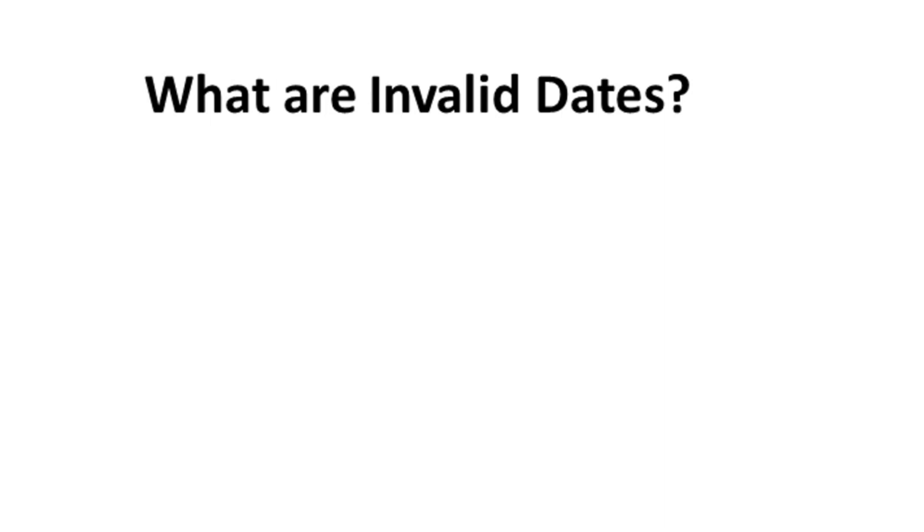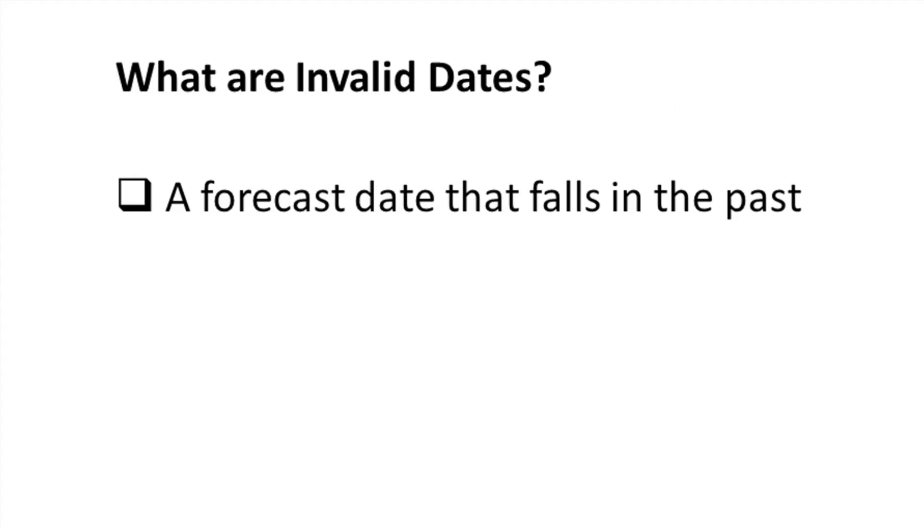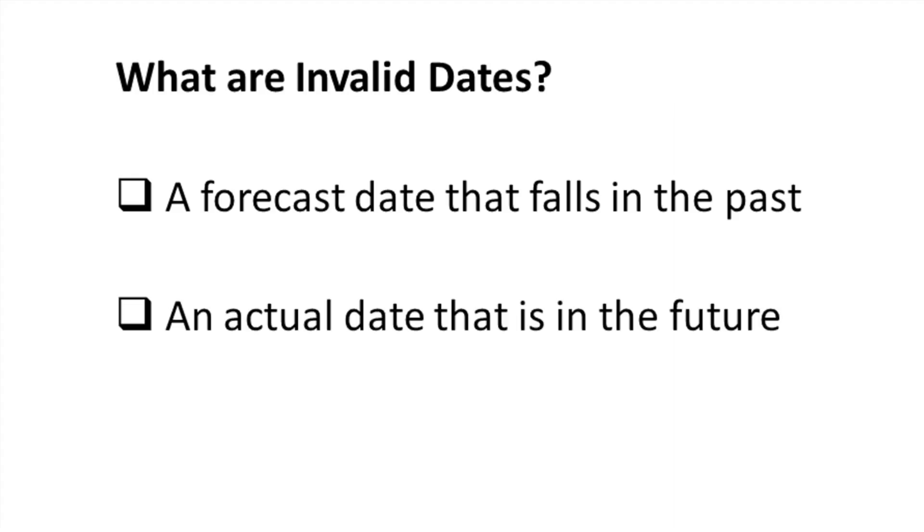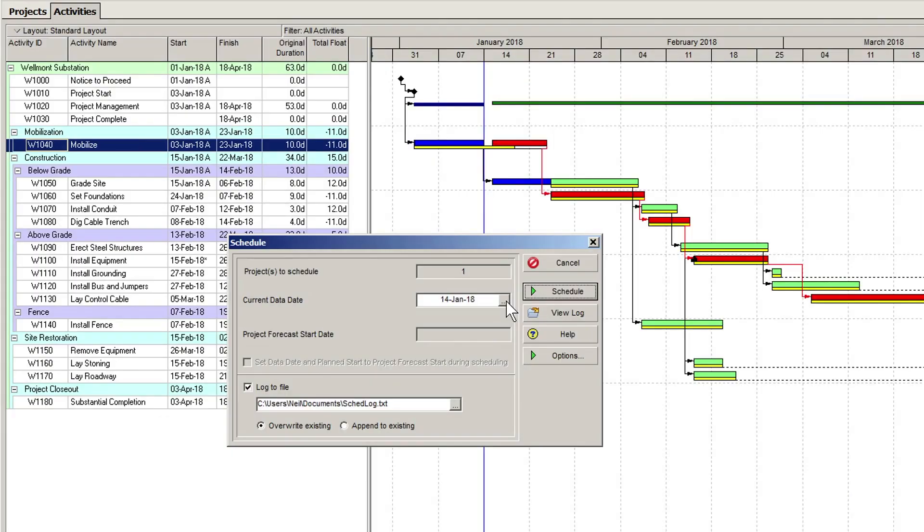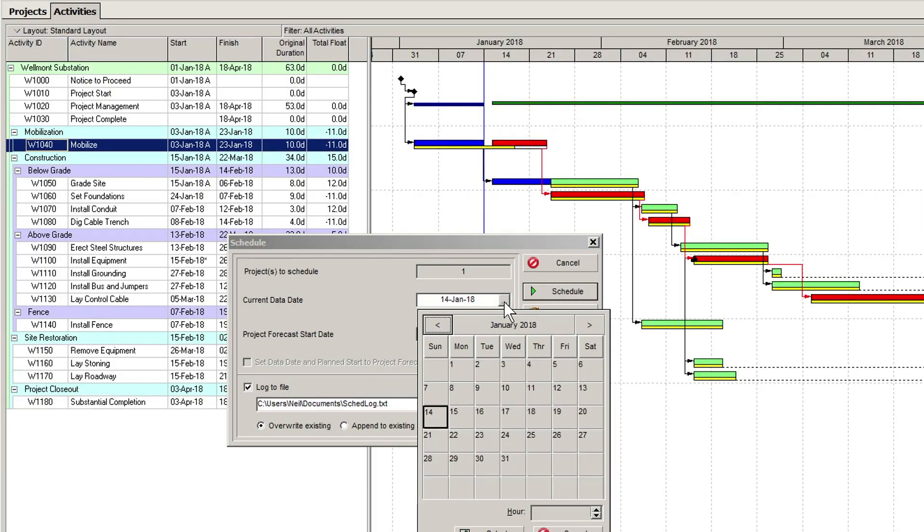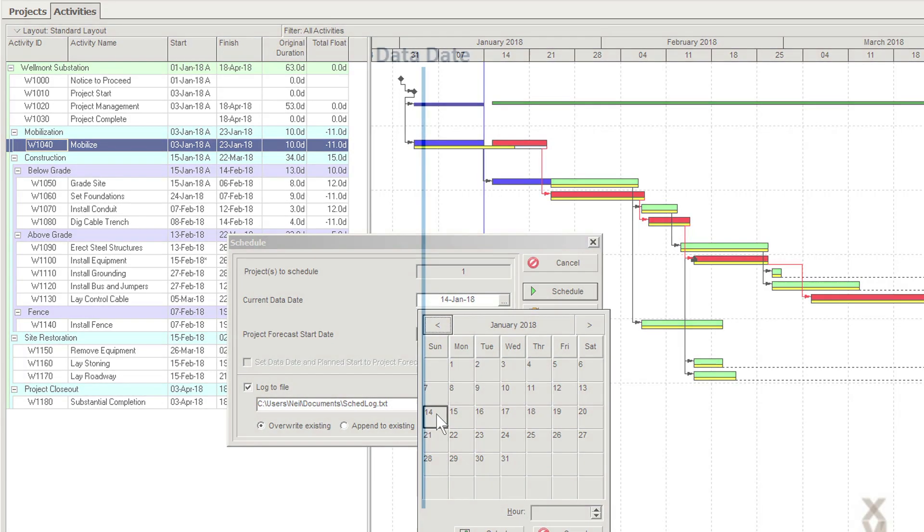What are invalid dates? An invalid date can be one of two things: a forecast date that falls in the past, or an actual date that is out in the future. In Primavera P6, when we talk about the past and future, we are talking about the activity's dates in relation to the data date.